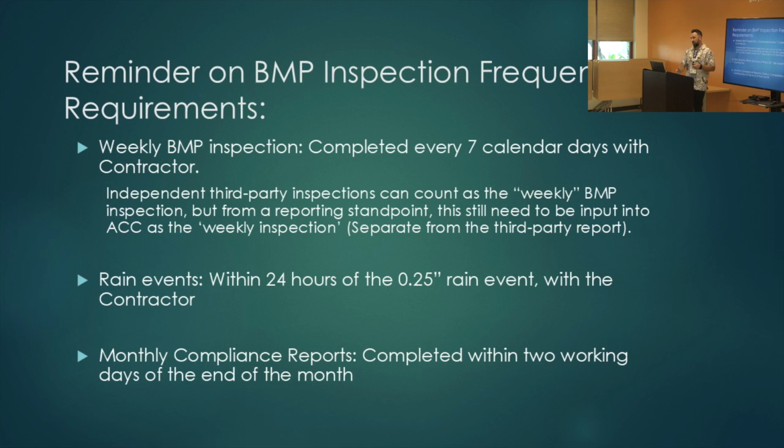And then as far as BMP general inspection frequency requirements, most of you guys are aware of this, but the weekly BMP inspection is supposed to be completed every 7 calendar days with the contractor. And the report is, again, generated and submitted every 7 calendar days.